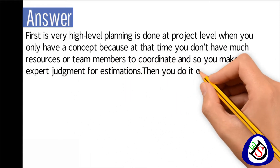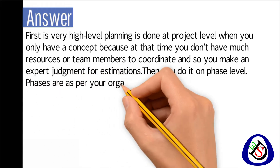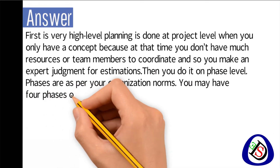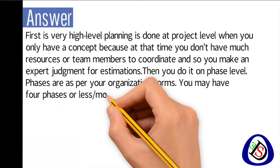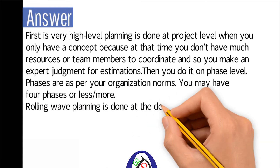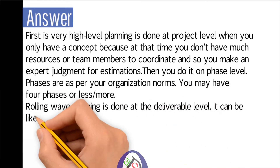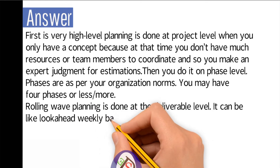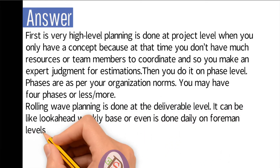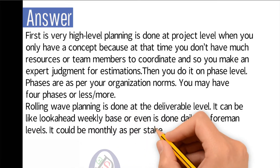Then you do it at the phase level. Phases are as per your organization's norms — you may have four phases, or less or more. Rolling wave planning is also done at the deliverable level; it can be a look-ahead on a weekly basis, or even done daily at the foreman level, or monthly as per stakeholder requirements.